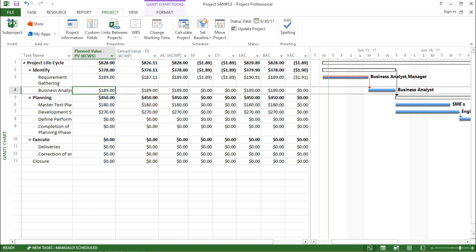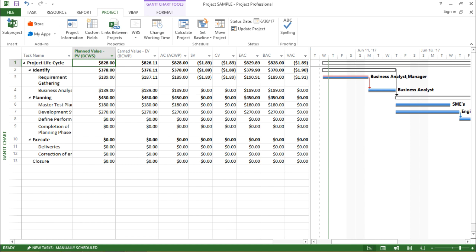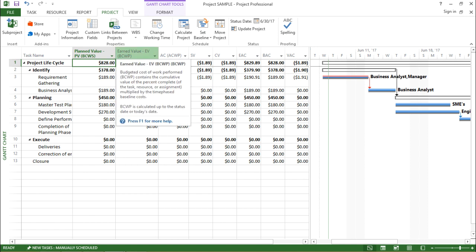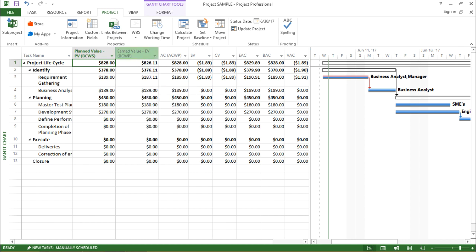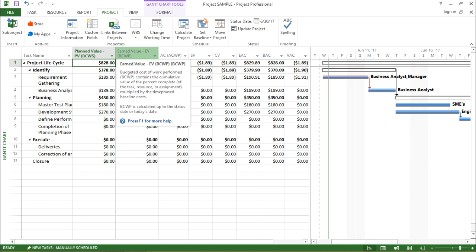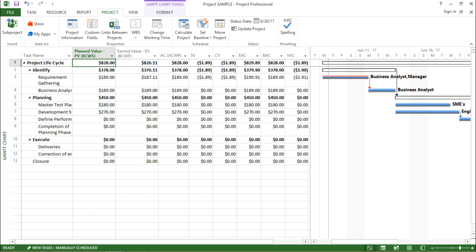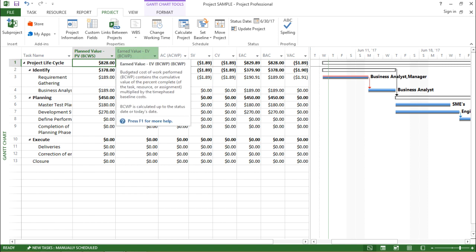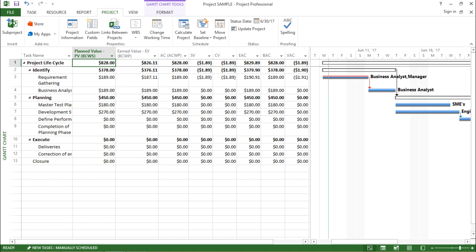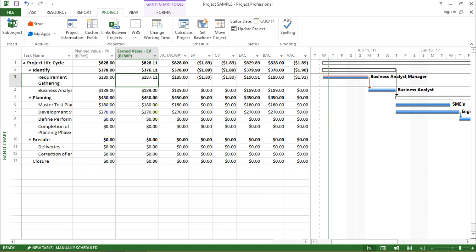Planned Value is the value which we have targeted for our particular project — the cost involved in this project's life cycle. Moving on, the next column says Earned Value. The tooltip reads: 'Budgeted Cost of Work Performed — contains the cumulative value of the percent complete multiplied by time-phased baseline cost.' Basically it has updated the project till today and taken 100 percent as its completion, which is the reason I am getting this value.